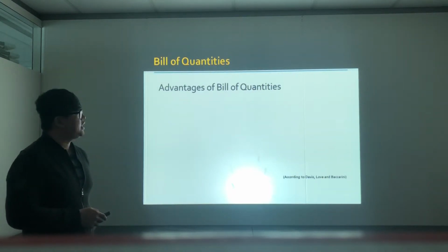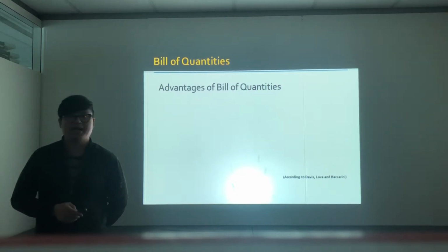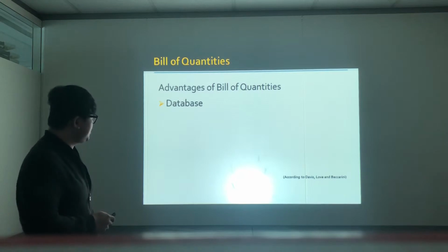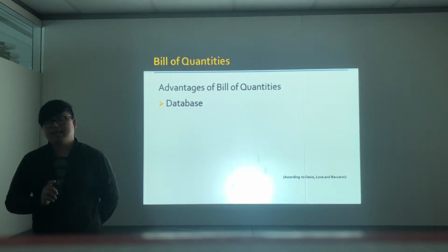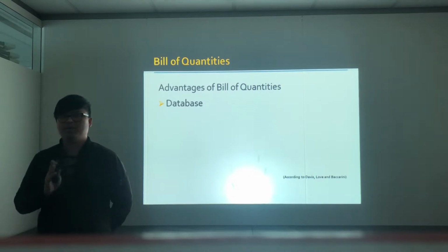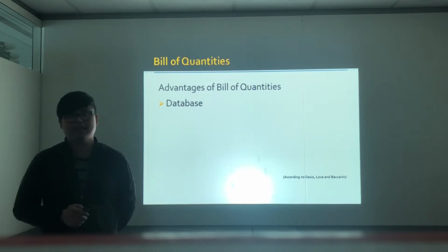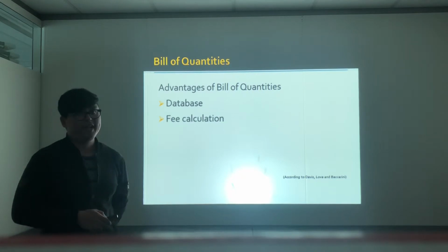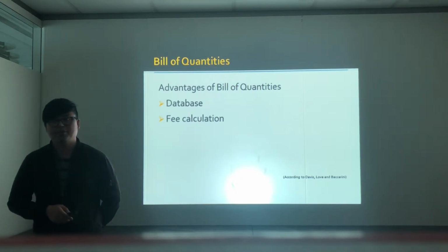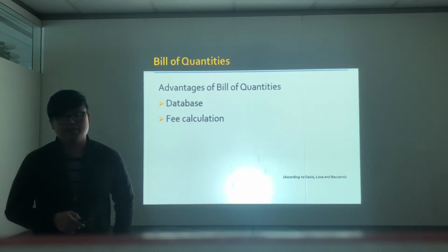Next are the advantages of bill of quantities according to Davis, Love, and Baccarini. And what are these? First is database. The pricing details within the BOQ can be used as a database for future estimating. Fee calculation: it also provides an absolute basis for the calculation of the consultant fees.